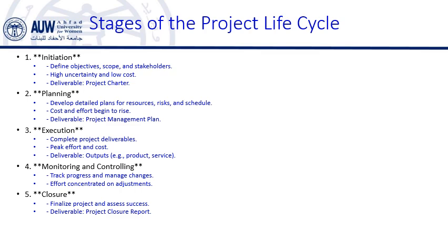The objective of this stage is that the project is officially completed. Deliverables are handed over to the stakeholders and the project is closed out. Now the team evaluates the project to assess performance and document lessons learned. The main deliverable of this stage is the project closure report, and this will also be one of the documents that you will be designing, which includes an evaluation of project performance, final outcomes, and any final deliverables or documentation.